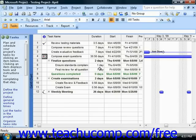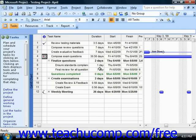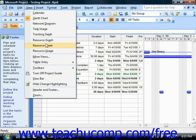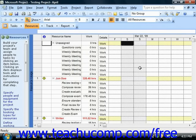In this lesson, we will examine how to monitor your resource allocation within your project file. One useful view that allows you to see resource allocations is the Resource Usage view. You can select this view by choosing View from the menu bar, then choosing Resource Usage. This view shows Resources, Work Contours, and Resource Allocation Issues.